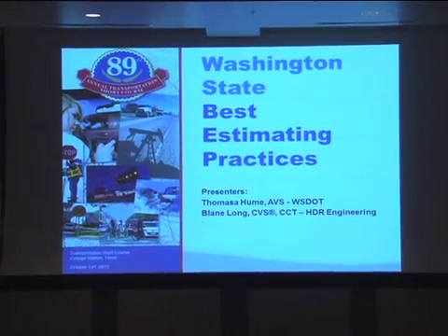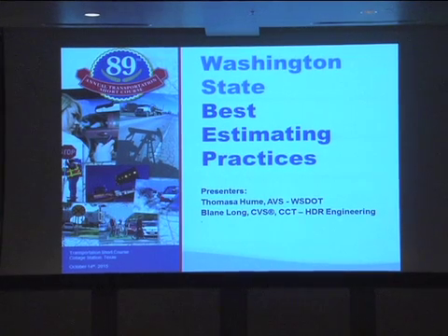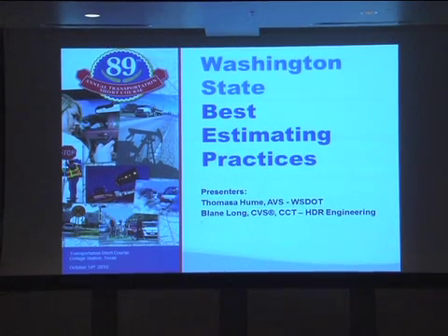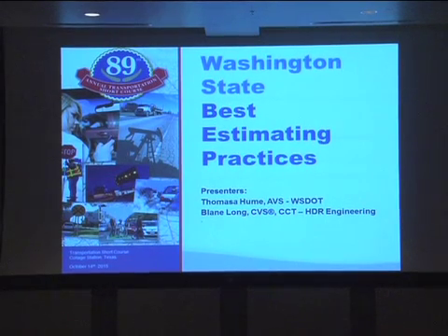The main reason for this, beyond limited staff and resources, is that most of us don't have the information to know what the contractor's resources, his labor, what he's going to sub out, any of that stuff, for sure. What using the bid history provides for us is a reasonable cost for typical items for typical projects.